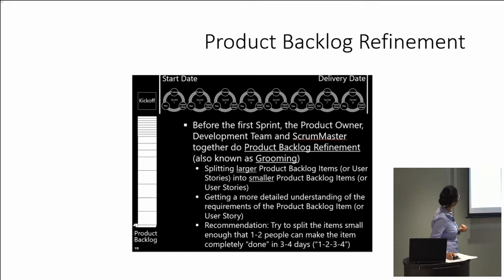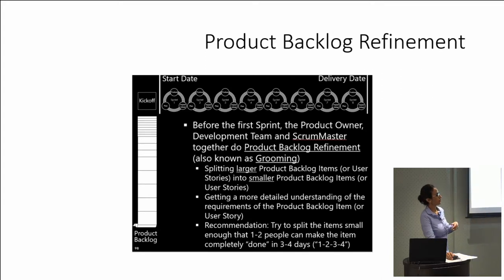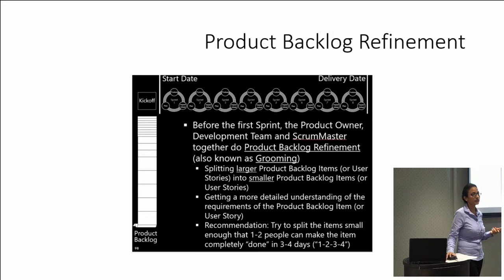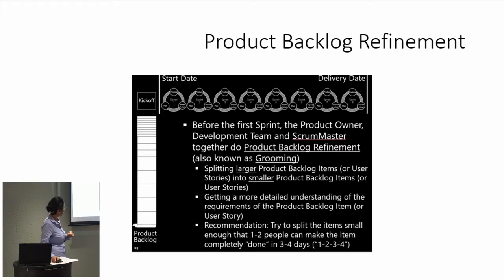Starting with product backlog refinement: before the first sprint, the product owner, development team, and scrum master together do product backlog refinement — slicing bigger items into smaller ones. Those bigger items can be larger user stories or epics. As the team slices through, they get a more detailed understanding of the requirements. The general recommendation is to split items small enough that one to two people can complete the item in three to four days.